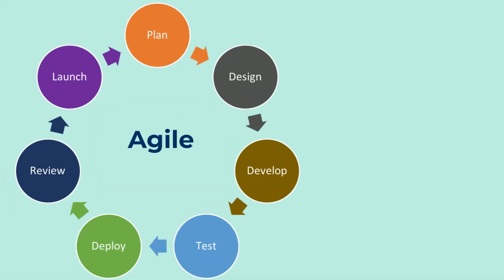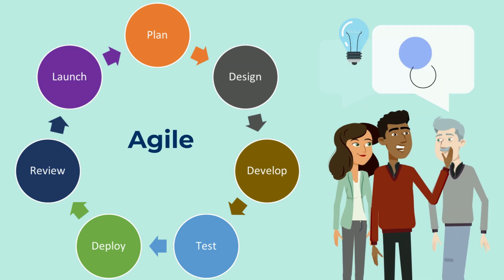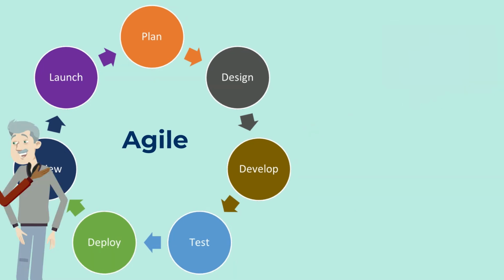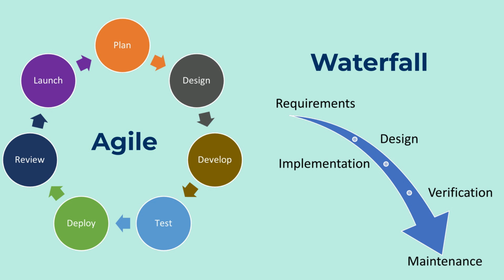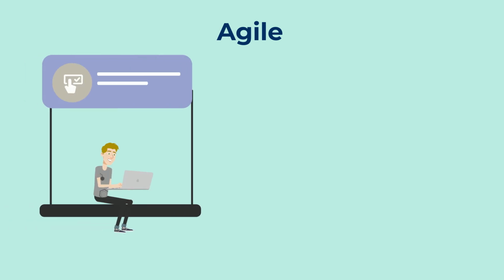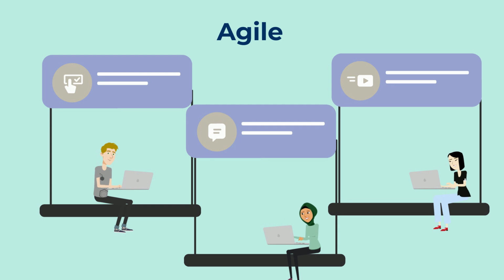Next, we embrace Agile as a software development method, emphasizing flexibility, iteration, and continuous improvement. This is in contrast to a previous framework used in many state projects called Waterfall. Waterfall requires rigid, upfront planning and releasing the project all at once. Using an agile approach allows us to release the system incrementally, focusing on and prioritizing features for each release.